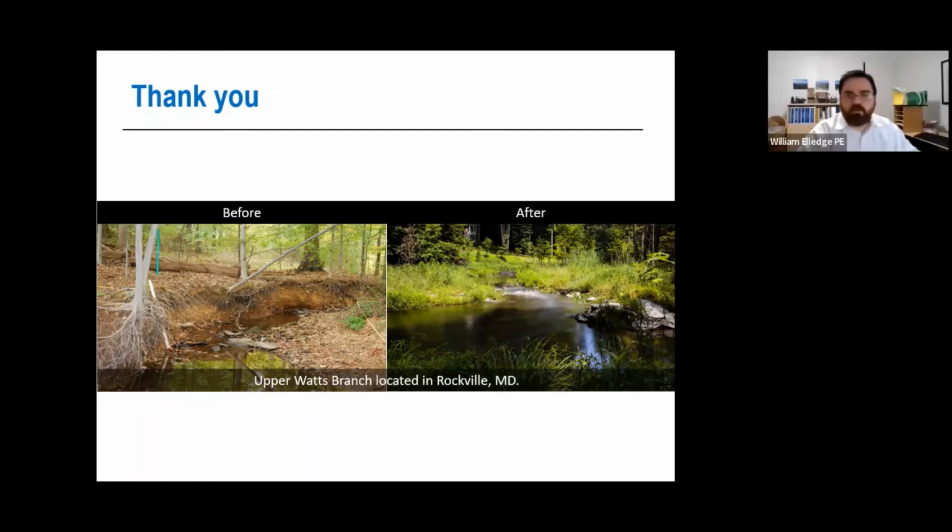And Marjorie, in the short term, we are looking at tree removal and tree trimming over the course of March, and access path construction over the course of the spring. The remainder of that work, as of today, we're just roughly saying summertime. We will share more details as we have them. Okay.